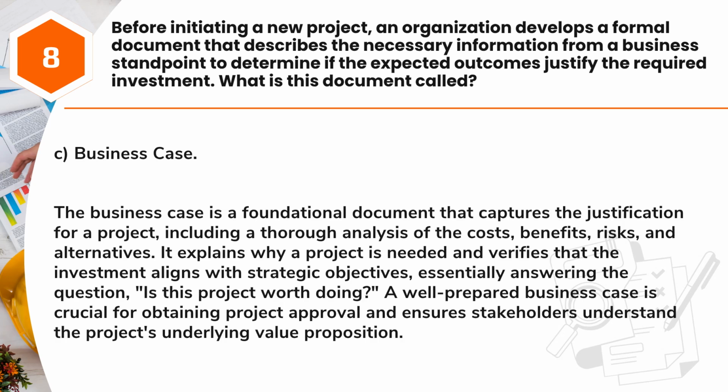Answer: C. Business Case. The business case is a foundational document that captures the justification for a project, including a thorough analysis of the costs, benefits, risks, and alternatives. It explains why a project is needed and verifies that the investment aligns with strategic objectives, essentially answering the question, is this project worth doing? A well-prepared business case is crucial for obtaining project approval and ensures stakeholders understand the project's underlying value proposition.